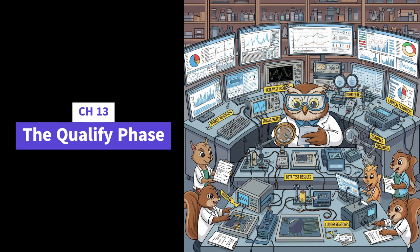Okay. And just like with marketing, I assume there's a final check and update of the operational plans? Absolutely. The functional plans for manufacturing and ops get updated. Any changes to deliverables, timing, costs, they get rolled up into the overall business case. And the key outcome? By the end, all the delivery systems should be prepped, tested, and ready to roll.